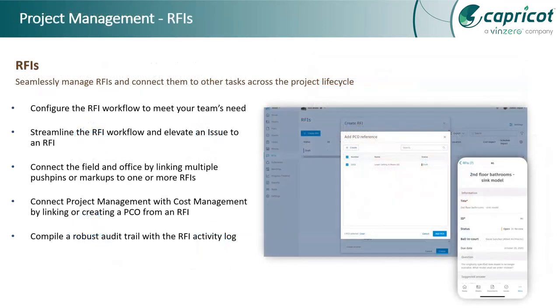So to start with, or let's say to deep dive into each of the tools of project management in ACC, we would start with RFIs. RFI is request for information, which is used throughout the project lifecycle for gathering or asking questions from the team. Mostly that happens from site and it goes either to the owner or to the design consultants through project managers, or if there are specific managers associated with it.